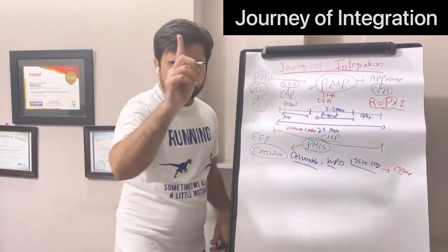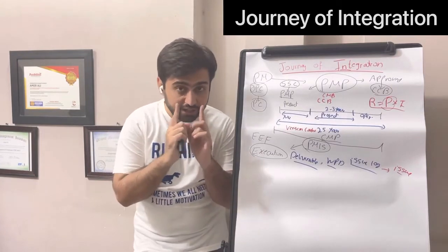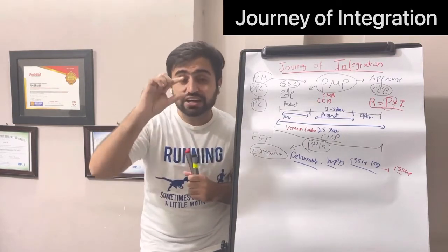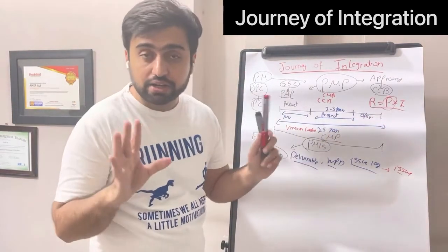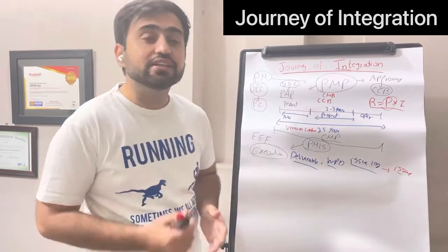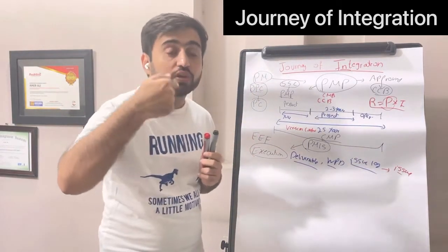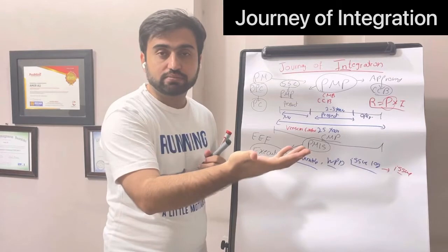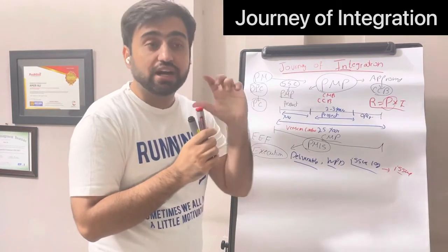Let me give you another example, a question you can see in the exam or in the box. An unidentified risk has occurred. What should the project manager do next? Since an unidentified risk has occurred, once something has occurred, its probability has become 100%. So it's not a risk anymore, it's an issue. We will update the issue log. Another one: an identified risk has occurred. Now it was identified, so what should you do? You update the risk register, an important thing. A risk has occurred, you update the risk register if it is identified, and if it is unidentified, the issue log.